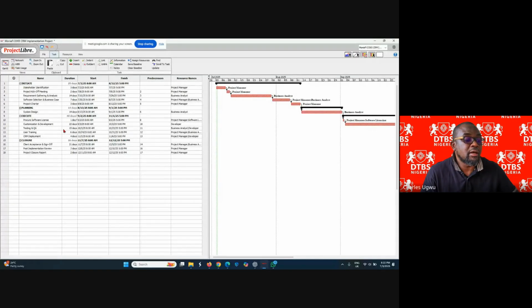Testing and quality assurance, we can reduce to 10 days instead of 15 days. Acceptance and sign off, we can reduce to 10 days or even 15 days. That's how we can then reduce cost. But we can leave it like this for now. It's just for training purposes.